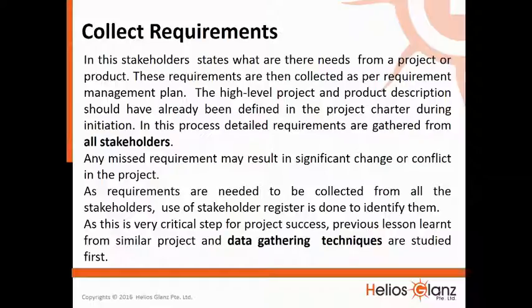The high-level project and product description should have already been defined in the project charter during initiation. In this process, detailed requirements are gathered from all stakeholders. Any missed requirement may result in significant change or conflict in the project.